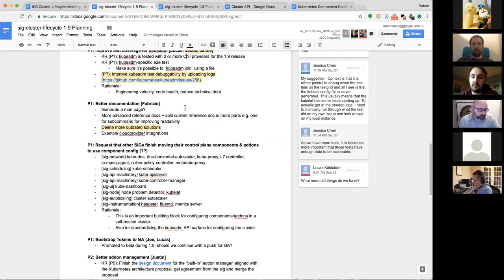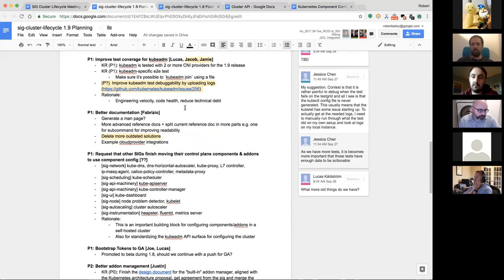Is part of this, we can discuss this later too. This seems like a lot of stuff already. I don't know how far we're gonna get down this road. Yeah, I'm just going down to see if we should adjust priorities and then draw where we think the cut line's gonna be and make sure we focus. Like this one in particular has 3 people assigned to it that are also assigned to things that are higher up in the doc, which makes me think that it is probably not gonna get done unless we either find different people to work on it or we split time, which risks the things that are higher up in the doc.